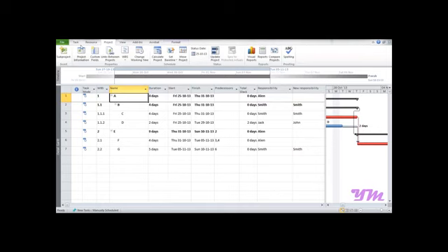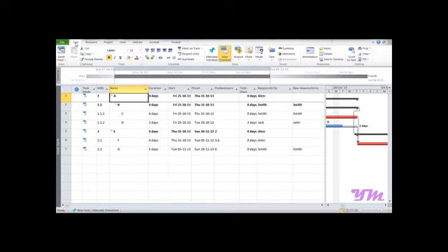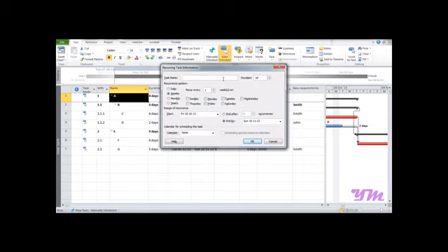In order to do that, go to the Task menu, and under Tasks we can see a small arrow. Click on it and go to Recurring Task. Over here you can enter the name, let's say inspection. Here you can mention the duration for which this activity or task would last. For the recurrence pattern, we select weekly or monthly, whichever is required.